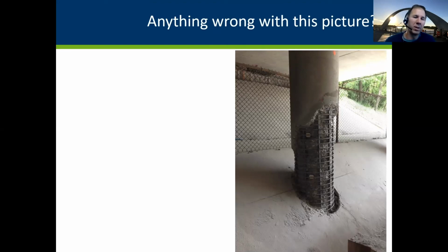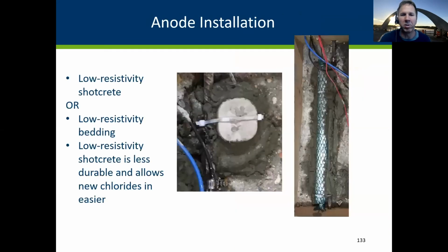So when your inspector has painted up any column repairs, if they're going to be chipping around the perimeter, we better get an evaluation in the bridge office, whether that's a safe operation. We might need to do it in stages so that reinforcement on the compression side of the column or flexural side doesn't buckle all the way. So this particular location the bridge was really restrained. It was more pure axial in that case.